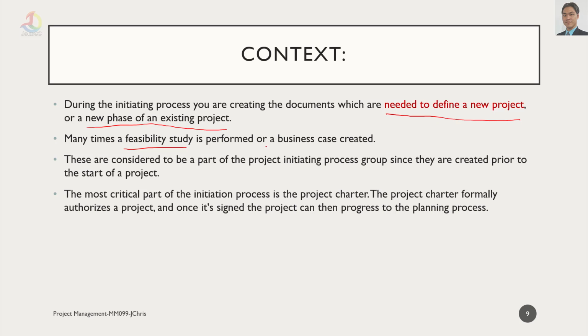Feasibility study will help you to make a case and make an informed decision whether to perform or not a business case to become a project. Now, they are considered to be part of the project initiating process group since they are created prior to the start of the project. The project itself is not de facto started yet, but it's still in the early phase.